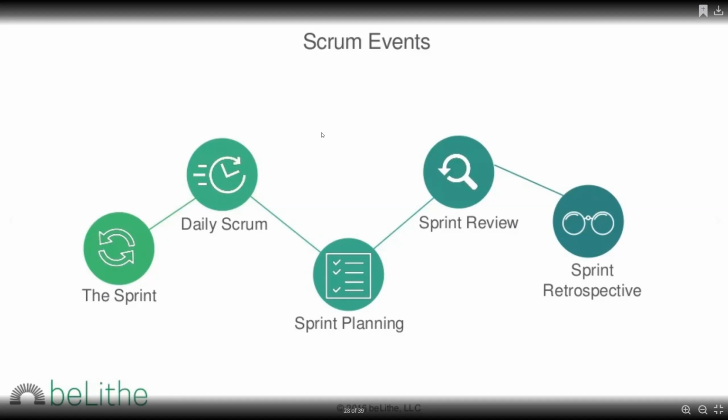The sprint is the actual development, what needs to get done to move things along. And usually it is no more than a month. Most companies stick to a 2-week sprint cycle. One company I worked for did 3-week sprint cycles, but typically you don't want to do more than a month. So in a quarter, you should be able to have at least a minimum of 3, or 6 or even more if you have a much shorter sprint cycle. With a shorter sprint, you can quickly iterate, catch errors and fix them in a matter of days, rather than going through quarters before you see the error. And quarters is a lot of months to go back and make a change, right?